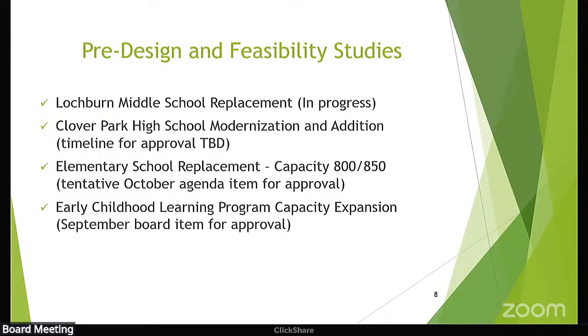And that brings me to the recommendations, where we're at right now. In September at board, we're hoping to bring a proposal to conduct a facility condition assessment and state study survey. We have an estimated cost from the architects and engineers of $500,000 with a tentative board approval for September and a timeline for that report sometime in January or February back to us, and then we would get it on an agenda for the board.